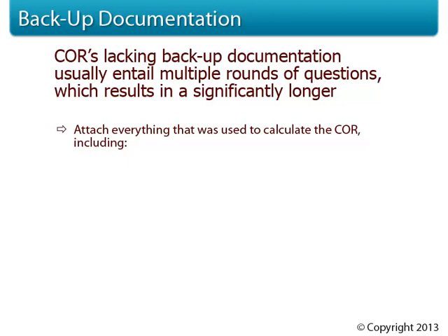Attach everything that was used to calculate the bottom line number on your change order request. Schedule comparisons. This is essential if you're asking for extra time. Now, I really can't tell you how many schedule requests I've seen on sub-quotes that are made with just a single line that says something like, additional time requested equals 2 days. Although I've probably seen this written 1,000 times, I can honestly say that I've never even once seen a time extension granted for a vague statement like this.